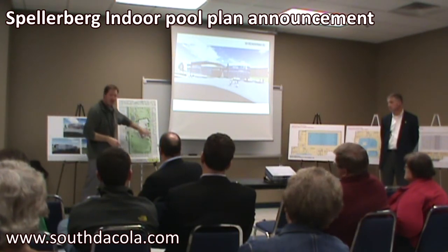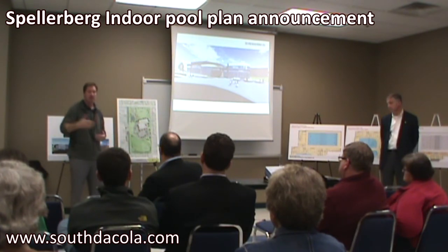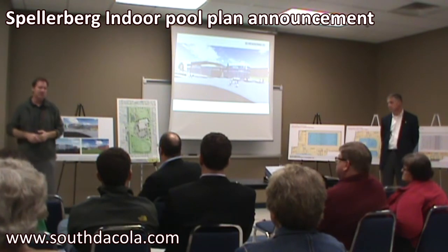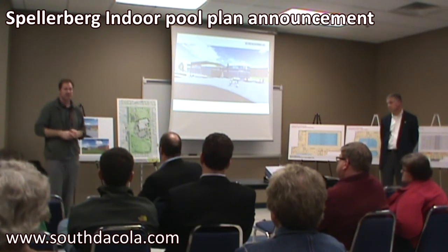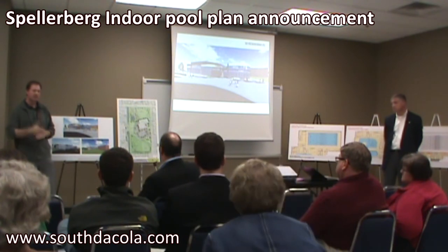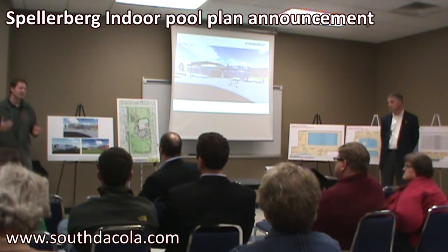Also, that strategy we talked about of building the gravel parking lot first right away, not waiting until the spring, really controls a lot of the debris that will get dragged out into the road. And any debris that gets dragged out into the road, we have street sweepers of our own that pick that up on a daily basis. We don't rely on other means to do that as part of the construction activities. But as far as the traffic, there is increased traffic during the day, but it's not a project that is